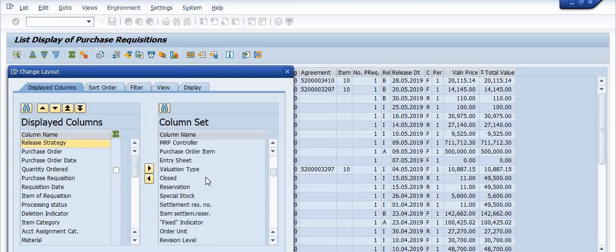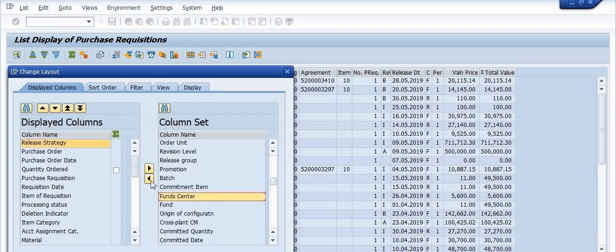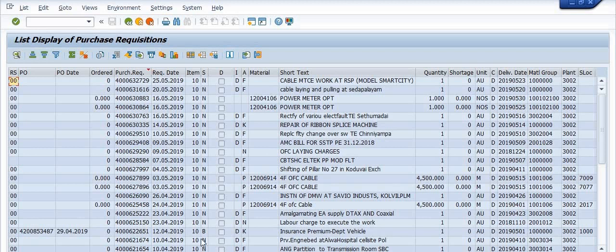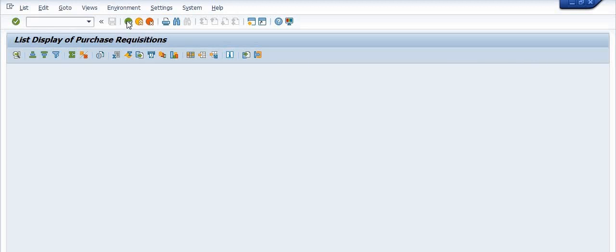If you want to include any additional columns, you can do so. For example, I want to include the fund center in our report — fund center is available here. Also, if a purchase order has been created for a purchase requisition, you can see the purchase order date. You can also identify which purchase requisitions do not yet have a purchase order created.